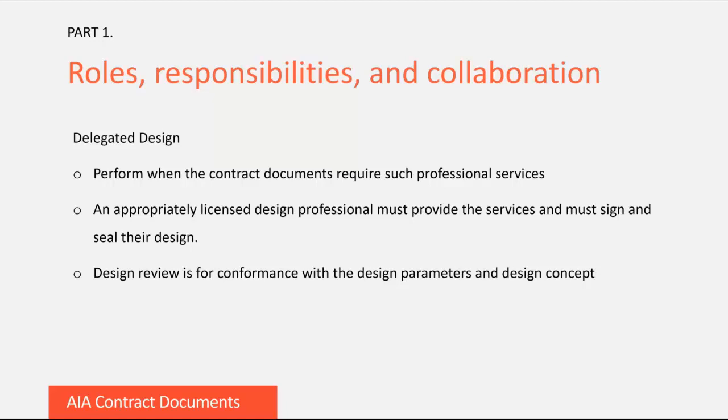So be sure that an appropriately licensed design professional provides the services, as they have to sign and seal their design. For delegated design submittals, just be aware that the architect or engineer will only review them for conformance with the design parameters and the design concept.